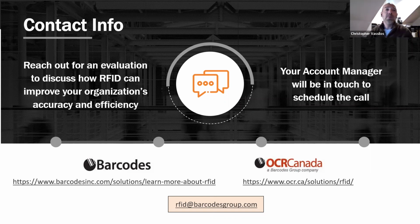And we're really going to test that out. And in the end, we're typically writing up some kind of a report that's giving you the results, the recommended bill of materials, the right tag, what performed best, what configuration made it work and achieve the performance. And on the rare occasion where there are compromises in order to get it to work, here's the process that you're going to have to change, which might be stop staging your gear touching the dock door in between the readers. You're going to have to back that up a little bit. Yep. Some things like that might go into that too. So I wanted to make sure you all heard that in case you want to engage with us. And that might be what the proof of concept is. It depends on the individual case.